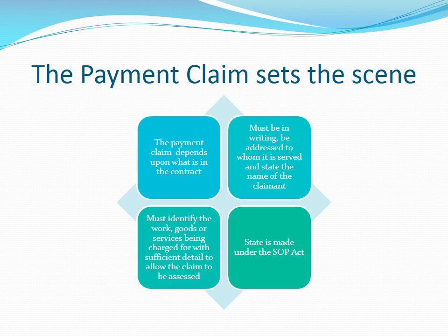From a legislative perspective, the claim must identify the person liable for the payment, identify what work or goods the payment relates to, and how the payment amount has been calculated. It must have a statement that it is a payment claim issued under the Security of Payment Act, which is appropriate in your state.